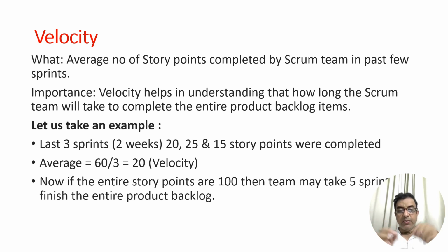So it all started with the story points. Story points are the most important thing that Scrum Masters miss in their Scrum events. In the sprint planning meeting, you need to identify story points for the user stories, then identify the velocity of the team. And once the velocity is identified, you can estimate what time you are going to take in completing that particular task.